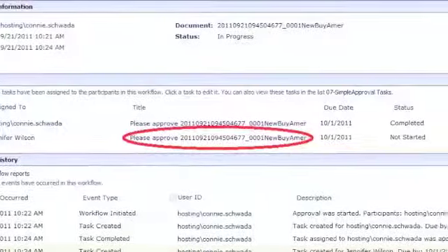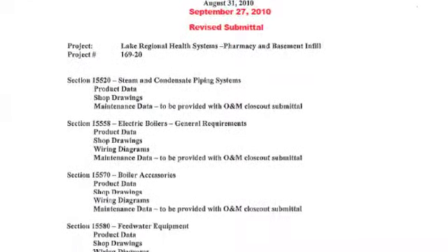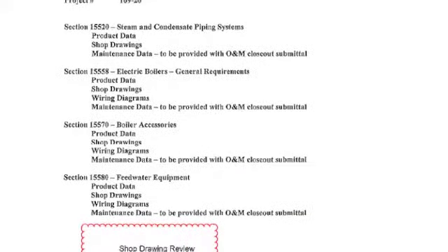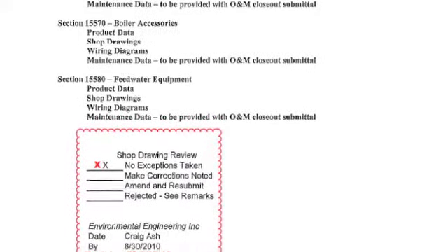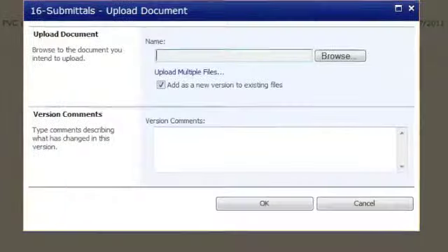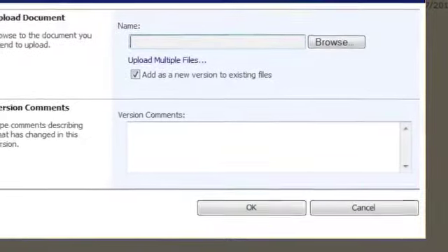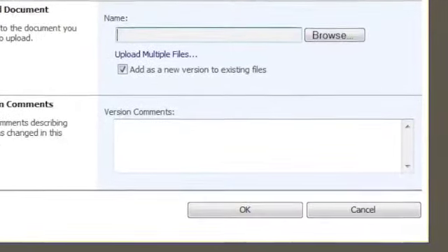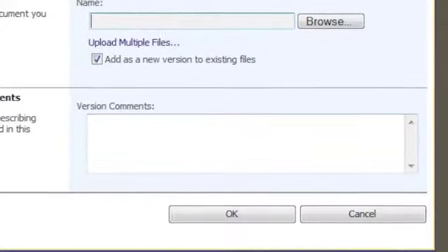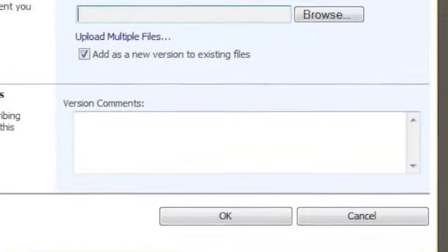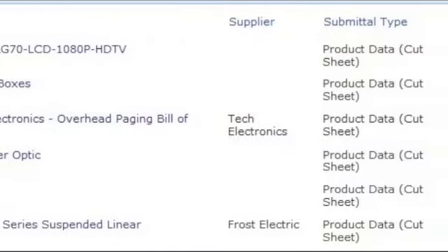The approver is first asked to download the submittal from the DataStart library to his or her computer for review, comment, and stamp. Once the review is completed and the PDF is stamped appropriately, the document is then re-uploaded into the DataStart. Through the wizard, notes can be added which all participants will see on the submittal library page. Also, the version history can be viewed at this time. The reviewer must now complete the DataStart workflow process.